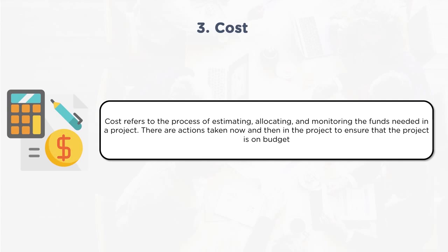Once this estimation and allocation of budget happens, that will become a base, and any deviations from that cannot happen so easily. Any deviations because of addition of scope can be handled through change management, but in an idealistic scenario, the cost should not escalate or come down. Organizations can also set certain tolerances at the project level, considering different scenarios, like scenarios of risks, or something which deviated from the deliverable. To what extent it can deviate, that tolerance will also be set from the monetary value perspective.